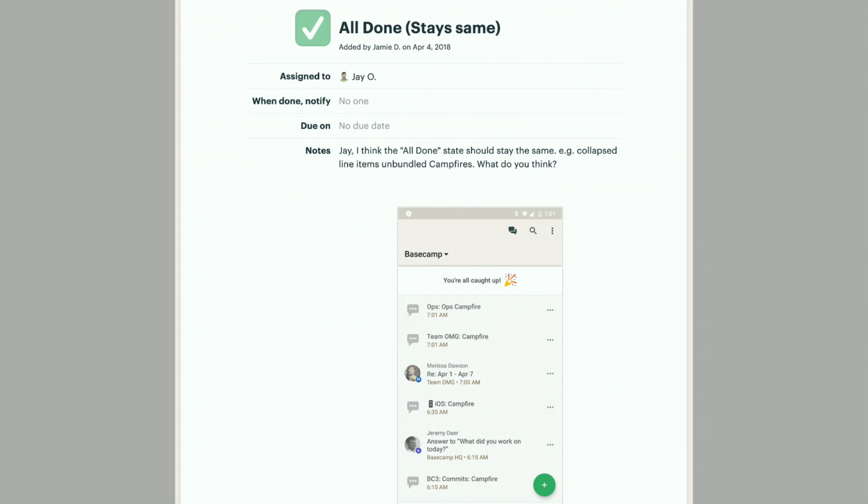So one of the things that we scope hammered or discussed was, okay, after you have these new notifications, what happens with the ones that you already read? If you remember, we had this working in the Android app. This is just a revision to it. And we decided, you know what, the previously read ones are fine as is. We don't have to add cards or do anything different there. Let's just keep it as it is. We don't have to waste time. This might sound weird, but when we're working on a new feature and considering what things to scope, for things that weren't part of the main concept of the feature, our default is to do nothing. We only make changes during a cycle when we think it's part of the core concept of what we're working on. And this is an easy way to cut scope if time is starting to run out.